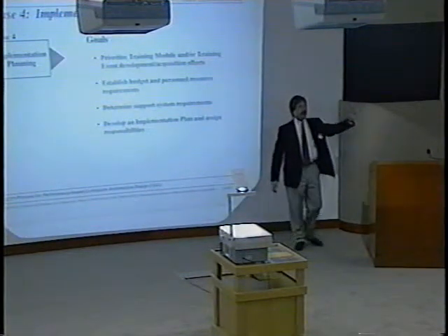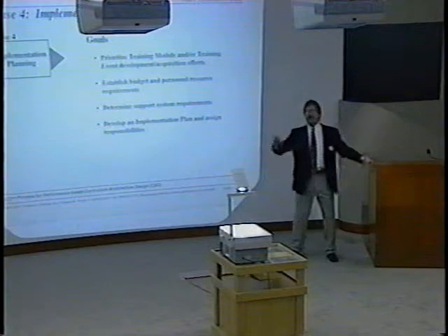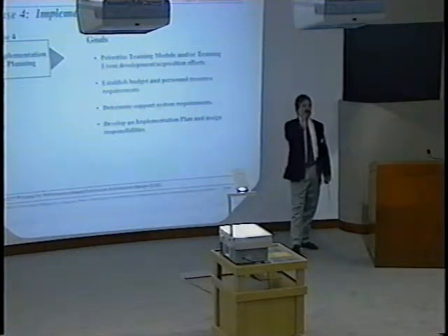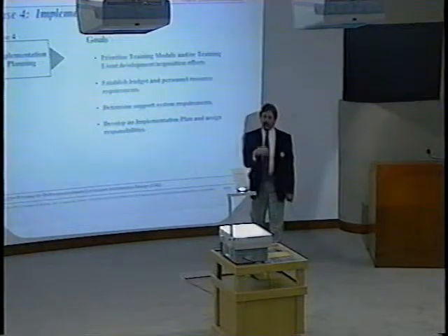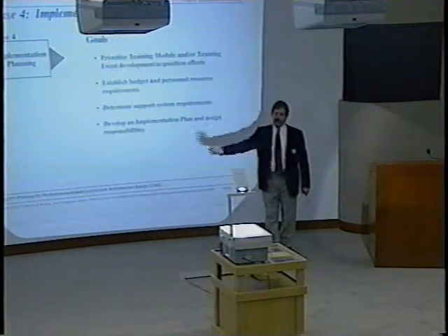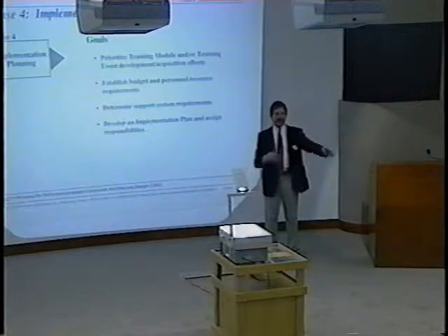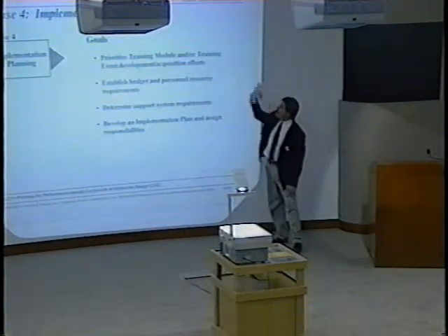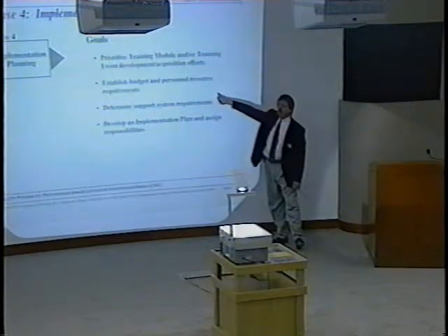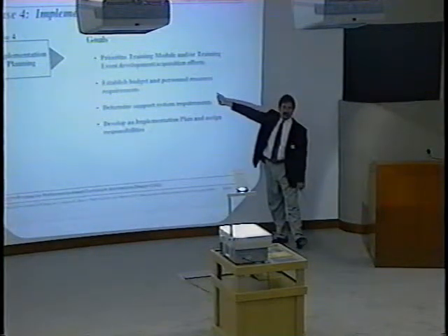If you know that you have group-paced classroom training or lab or CBT or self-paced or video-based, and you know historically what your developmental costs are, so you can ratio that. If I build 8 hours of this or 40 minutes, an hour of that, I know what that's going to cost me approximately. I can do resource planning based on this curriculum architecture design. Once I have the priorities, I can tell you what the resource implications are.